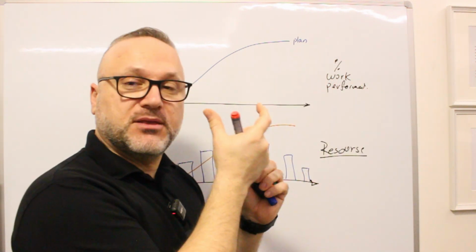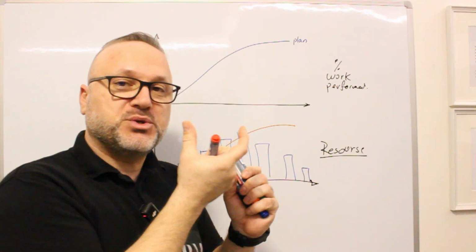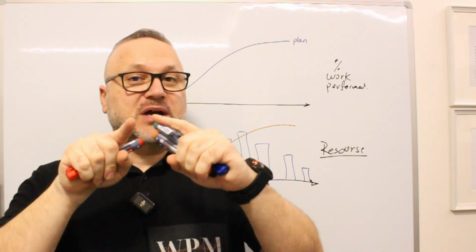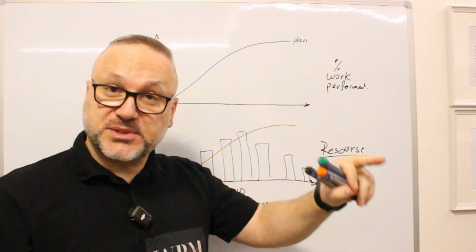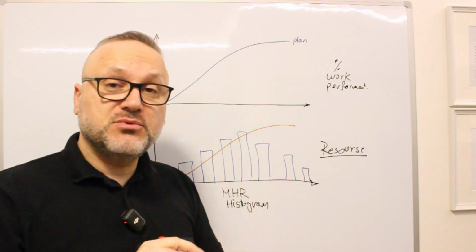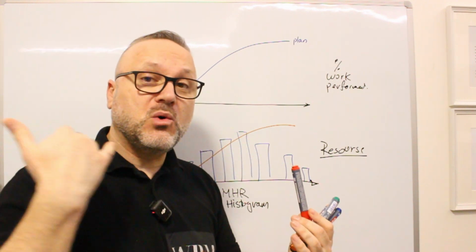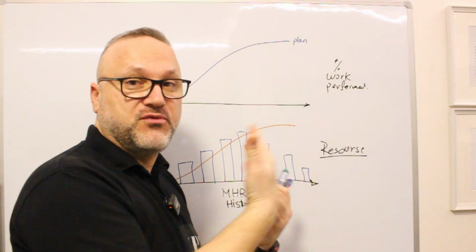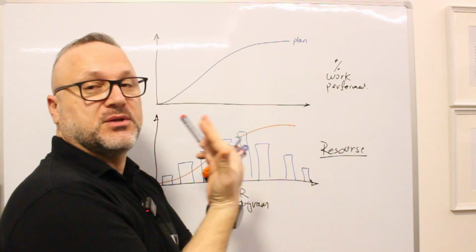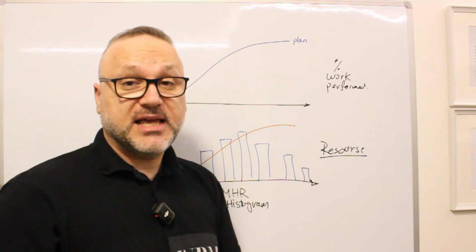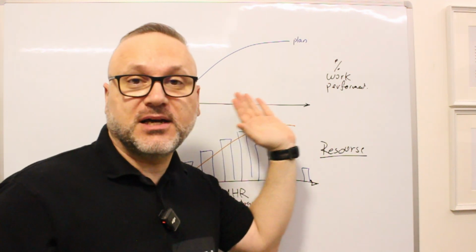If I take those tasks and push them forward or backward, I have to assign my resources to those tasks, and I can do those tasks earlier or later. We take all the tasks that have float and take them earlier to complete them earlier. So we say that this is the early start plan.